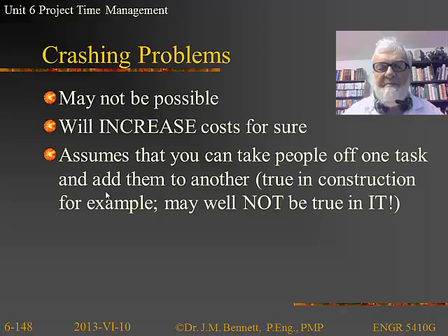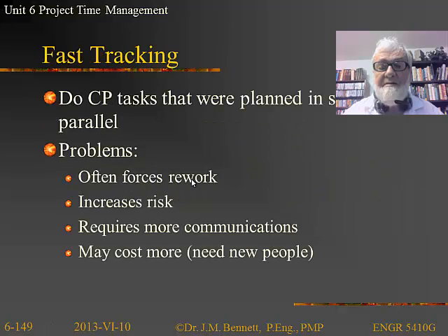Now, for some of the problems is that it may not be possible to crash anything. It's for sure going to increase the cost, so you're trading cost against time to do that. And more importantly, it assumes that you can take people off one task and put them on another. And maybe in construction and areas like that, that's true. But in more technical areas, it certainly is not true.